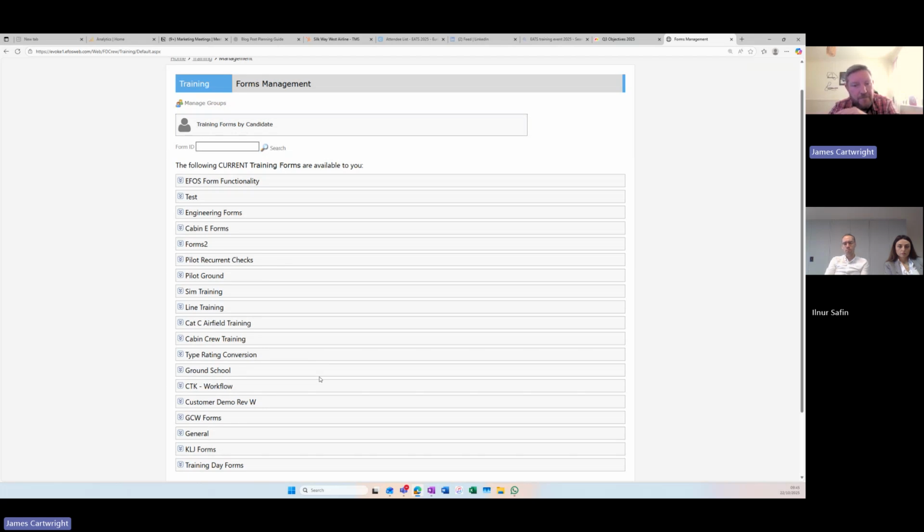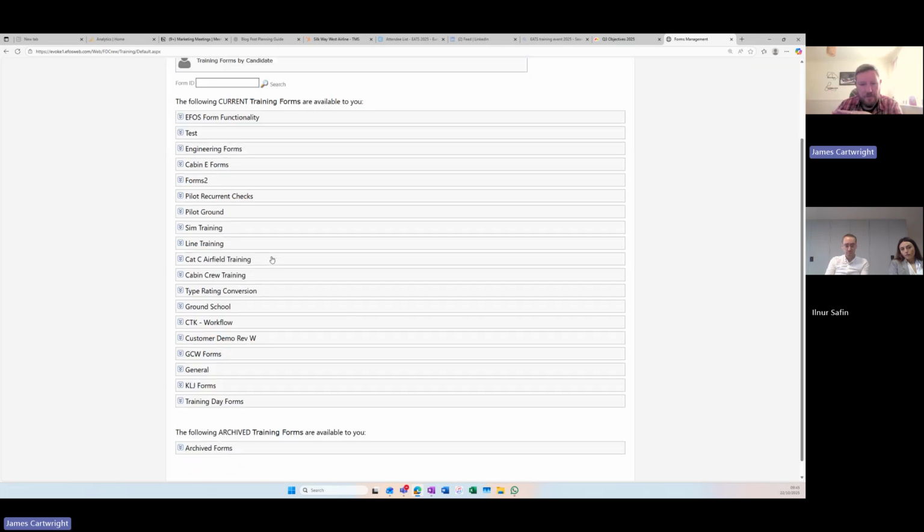as we train you to use it there. We're always very conscious of the fact that there will be a period of time where you'll be running two systems, because you've got to demonstrate to the regulator that this is a step forward. So you've got to deliver today's training whilst thinking about what's going to happen tomorrow with the new system. So we try and reduce the impact as much as possible there. Any questions on training forms?